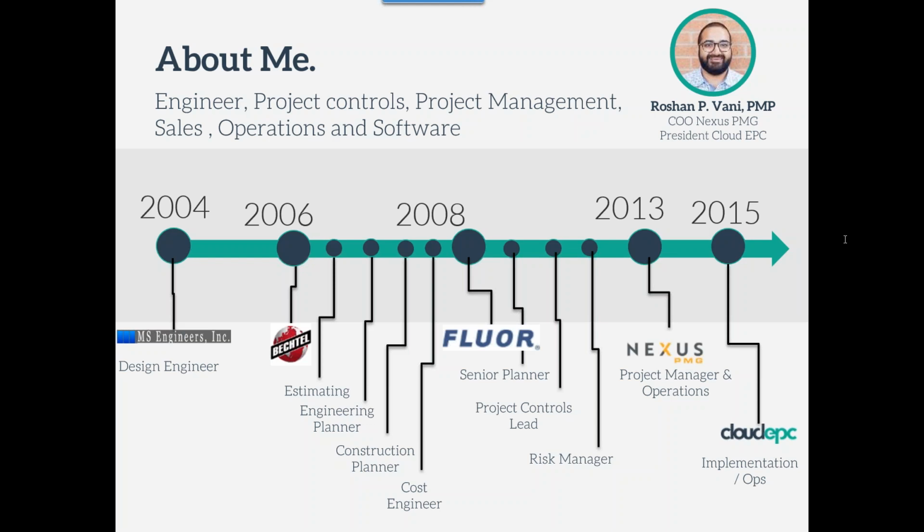And this is really where progress plays a big part in our life, and I'll touch on it a little bit more, because validating where they are in construction is a big part of being able to sign off. And not just construction. I know I'm going to be heavily focused on construction, but this is also true on EPC jobs, where we also need to validate the engineering progress as well as procurement. So that entire EPC life cycle and the different phases of that life cycle, being able to really analyze what is the percent complete and how are we validating it, and doing our best to remove the subjectivity is a big part of Nexus PMG, and a part that I think sometimes gets overlooked. We talk about earned value management and all the great things it can do, but one of the biggest cores of the earned value process is the percent complete, and we'll really get into that here in a little bit more.